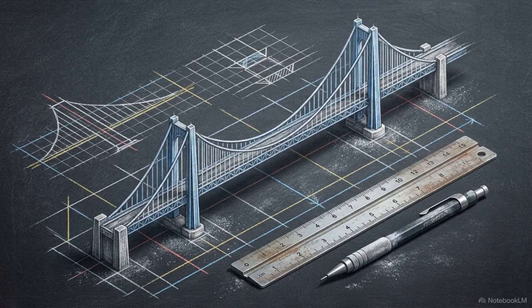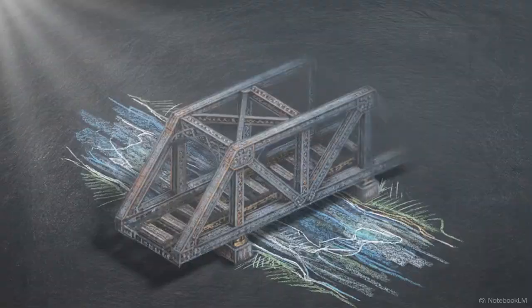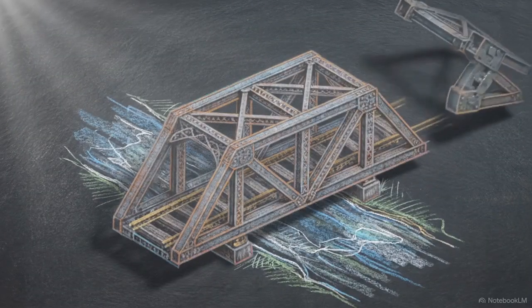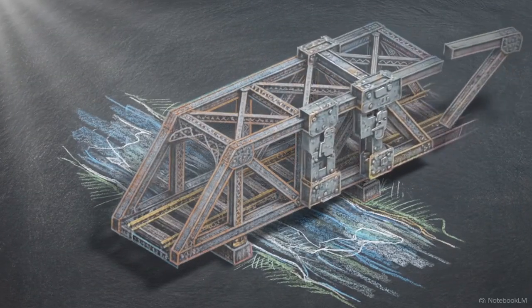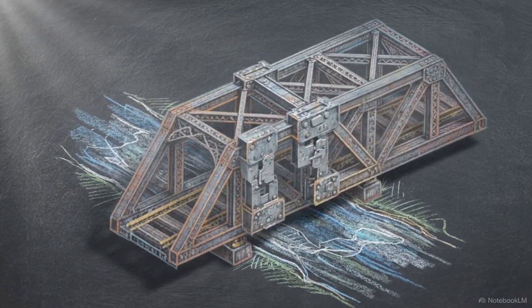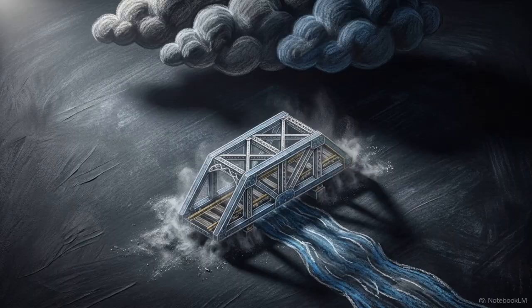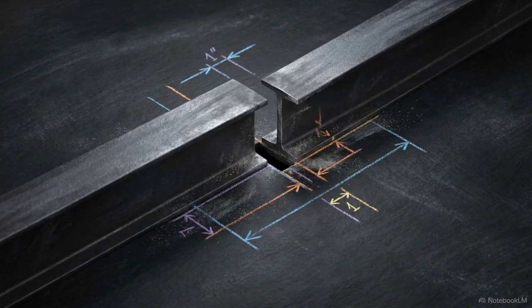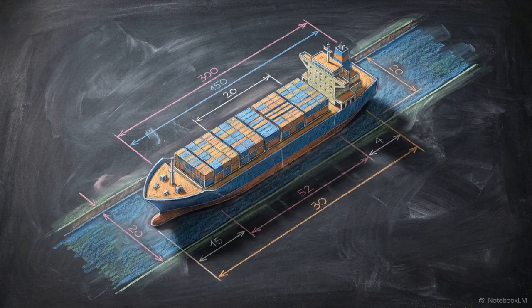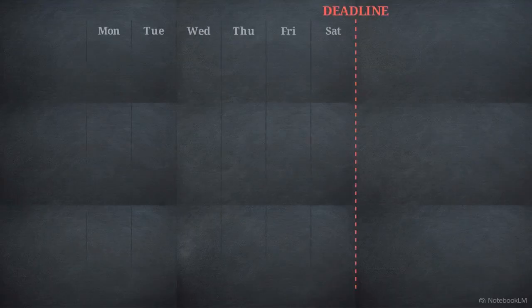In traditional construction planning, the critical path method assumes that a schedule is deterministic. If you are building a massive steel bridge, the model requires a precise, fixed time estimate for every piece of the project. But large-scale engineering does not operate in a vacuum. Projects face systemic uncertainty, severe weather, supply chain disruptions, and human error.